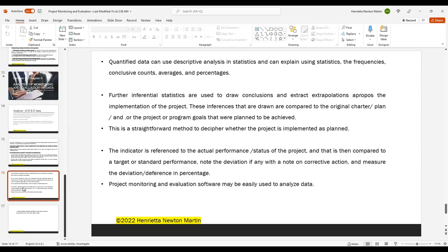So the indicator is a reference. Here, there is an indicator, which is the particular you seek to evaluate, and the indicator is a reference to the actual performance. I want you to visualize a table before your eyes. The first column deals with the indicator. Then there is the actual performance, or the status of the project, and that is compared to the target or a standard performance. So now you will note the difference,